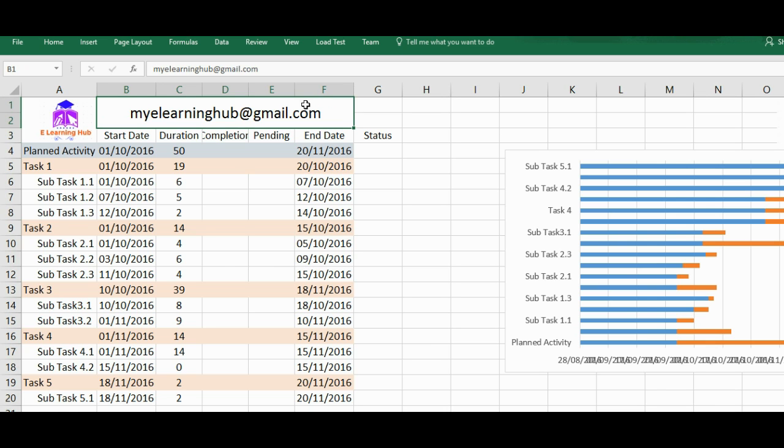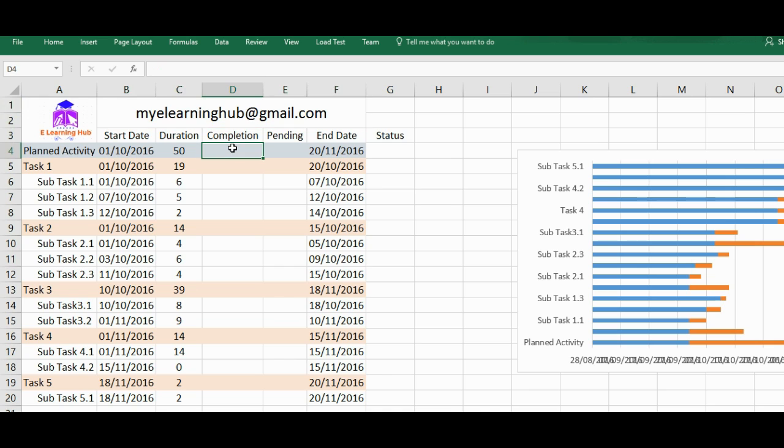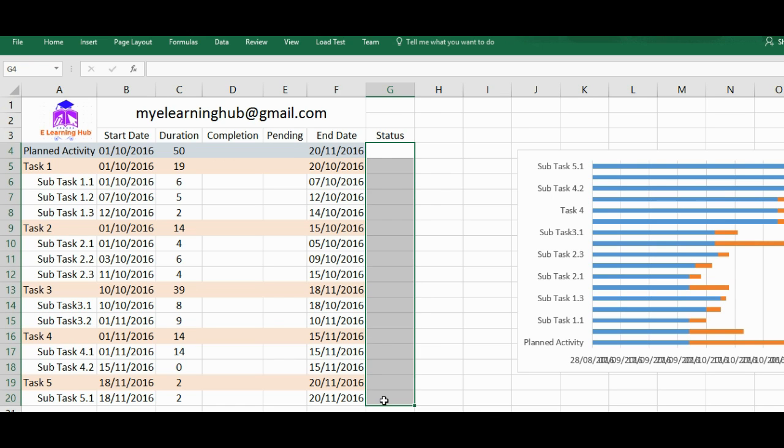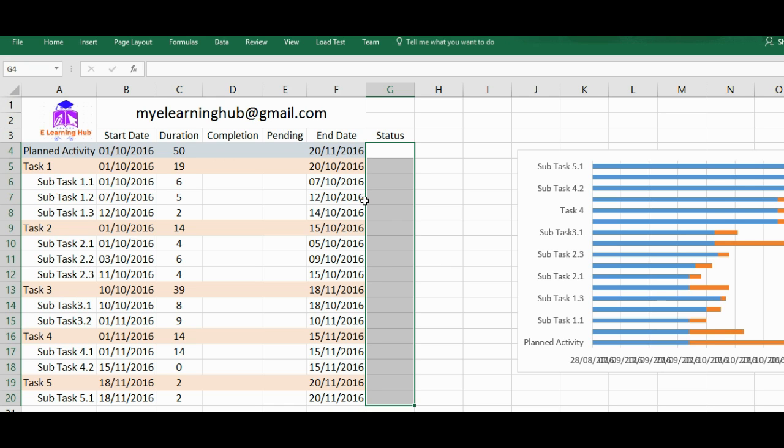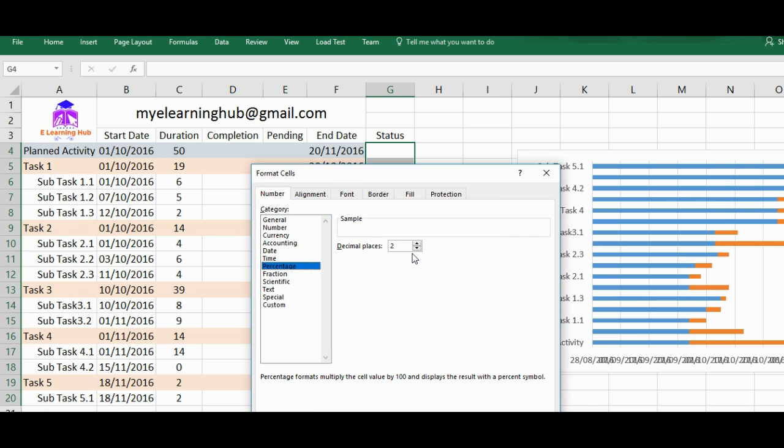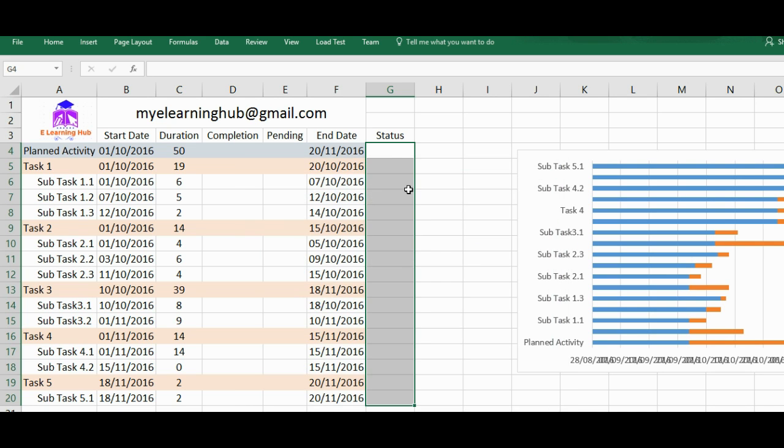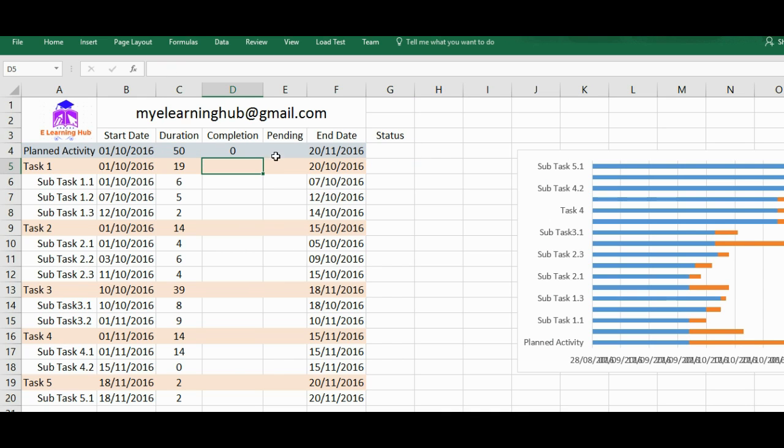Then completion is the part, whatever status is given. That's the completion. So I'll just convert this as a percentage. Let's say it's a percentage. We don't need any decimal place over there. So completion equal to status multiplied by duration. This is completion.